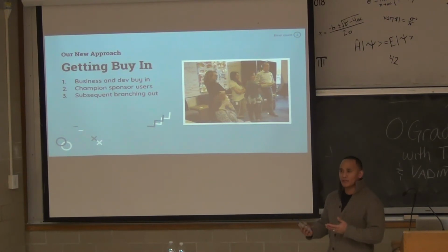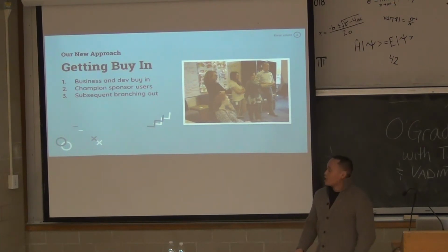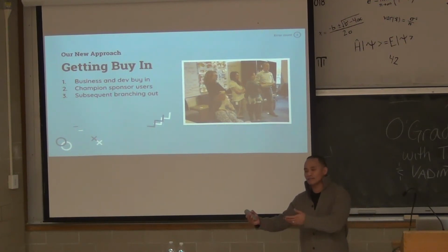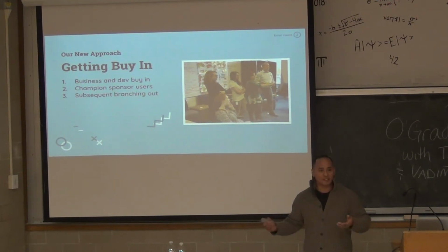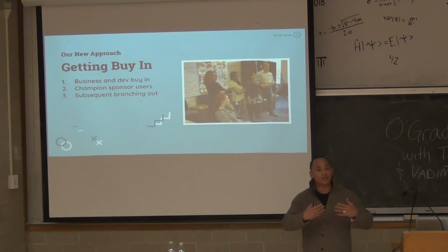Doing an intranet is a very large task because you have a lot of departments and a lot of stakeholders involved. As designers, we have a lot of duties and tasks on our plate, and you can't go out to every department and start getting buy-in on every single stakeholder. That's a day job in itself, right? So we identified key stakeholders or sponsored users, and we showed them our designs. We told them what we were trying to do. We got buy-in from them, and they essentially went out and started pitching this to other departments within the organization. Which freed up our time so we can focus on the user research and the design.